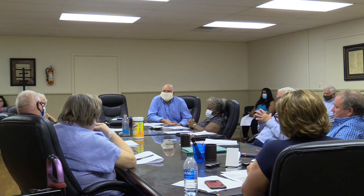I understand. Most of their draws, in my experience, have been pretty close to the same amount on the construction side. They'll generally do certain amounts at certain times. Well, why don't we look at doing this? Every time they make a draw, that's what we should appropriate out. We roughly keep $1 million in that account. So maybe just do a draw for 600,000, and on that budget, if nothing else, we appropriate that 600,000 back in. But are we going to have enough money to make their June 1st request?